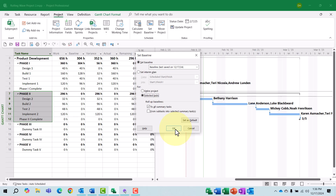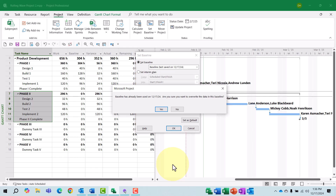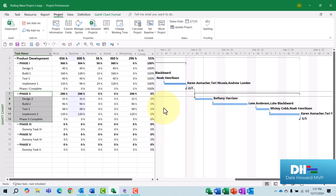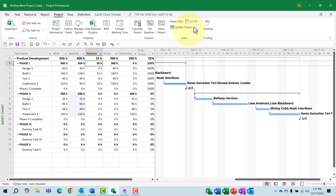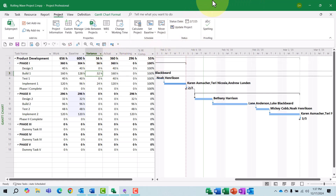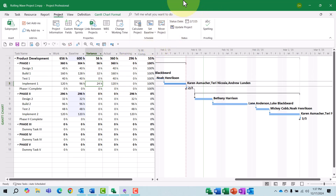When I click the OK button, Microsoft Project is going to complain that I'm going to overwrite the baseline data. But no — I'm not overwriting the data in the baseline. I'm appending the current baseline with the information from Phase 2. When I click the Yes button, notice the following: there's no variance from Phase 2. The original 56 hours of work variance for Phase 1 are still present — the 32 hours on Build 1 and the 24 hours on Implement 1. At this point, I'm now ready to begin work on the Phase 2 section of the project, and then I'll begin completely planning Phase 3.